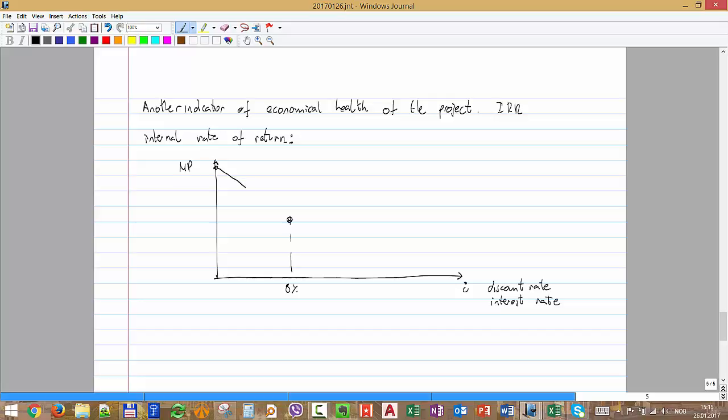We will have a maximum, because that means that the money doesn't lose any value with time. Okay, so really that maximizes the NPV. Remember, this NPV is the sum of all the present values, okay, of the cash flow of the project every year. But if we start increasing it, we will see that it will reduce value until it's 0. NPV at this particular point is 0.